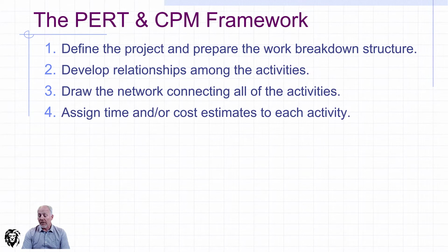And if you haven't already done it, we'll need to go through, and for each of those work packages, we need to know time, cost, resources needed by each of them. So we probably started that right at the work breakdown structure when we were first doing our work breakdown structure. We wouldn't have stopped doing it, but now we're going to have to make sure that all that information is complete, because it needs to be integrated into our schedule in order to estimate the time associated with completing this network.